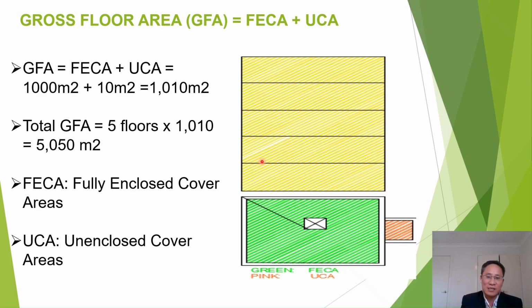I noticed that some people may misunderstand and include the rooftop and the rooftop of the basement. And UCA, the unenclosed covered area, usually refers to the balcony.